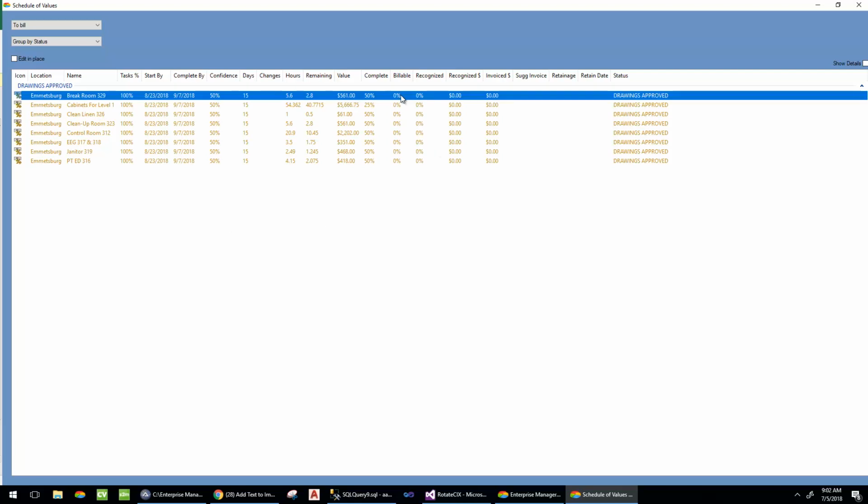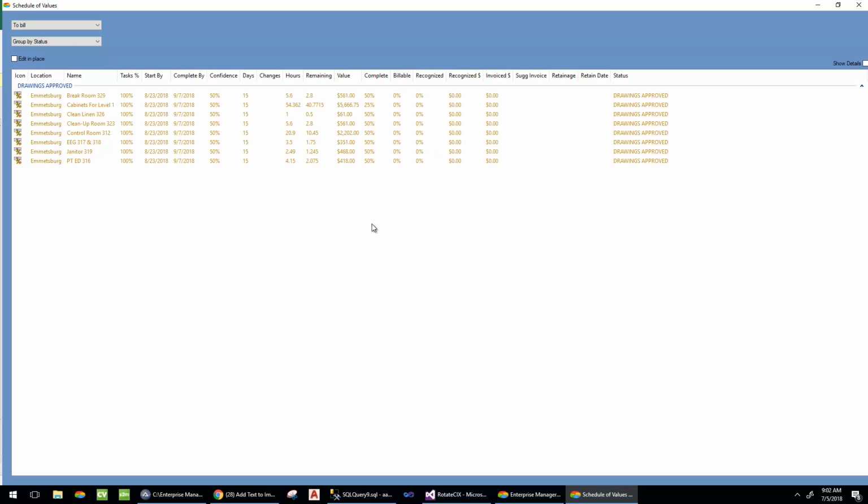And so if I'm a PM and I'm doing this on my regularly scheduled time of the month or the week or however often you want to do this, I'm going to enable edit in place mode. And I'm simply going to set this one to 50% and this one to 25. And maybe I know that I can bill a little more on this one than I'm complete, and that's fine. And maybe I know, even though this shows 50%, I can only bill 25 for some reason. That's fine too.